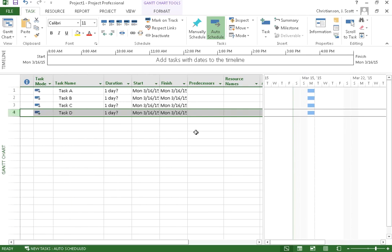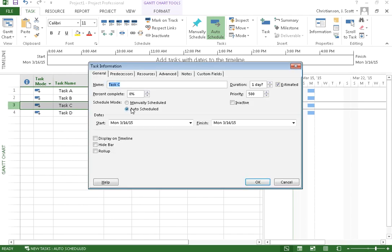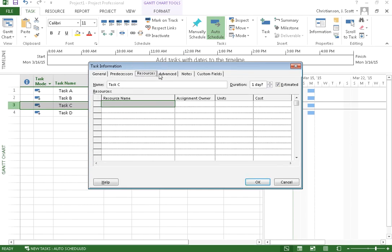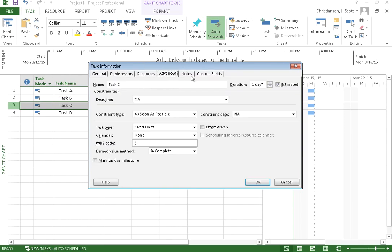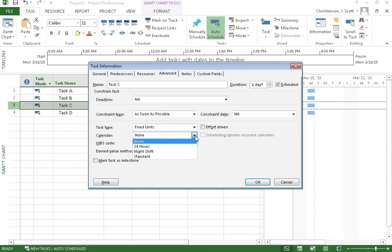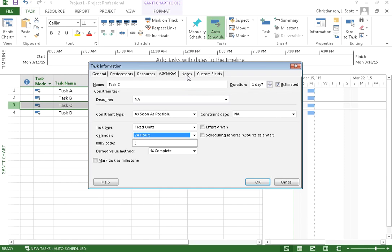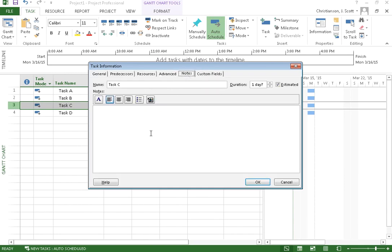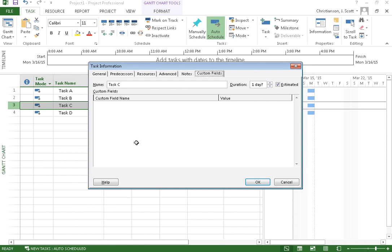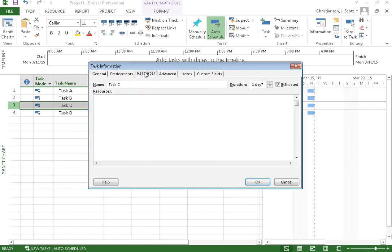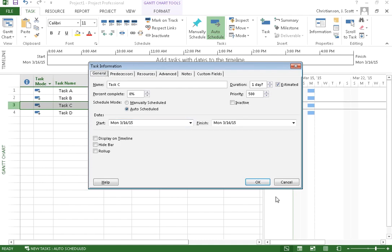I can also double click on the task name or on the task row and it will bring up the task information dialog box where I can set some other information about the task. So I can change the name here. I can change the duration and, you know, as you can see, there's lots of different information I can change about the task. So if this particular task uses something other than the standard calendar, I can say that this one's going to use a 24 hour calendar, for example. I can also put in different notes about this task. I can also have different custom fields that I create. So that's where you can get to all this information about your particular task.